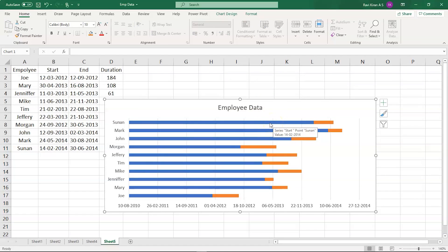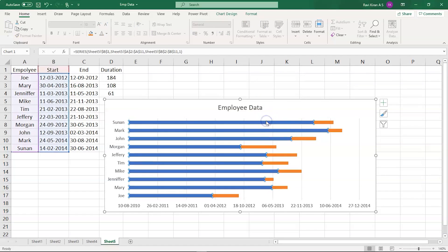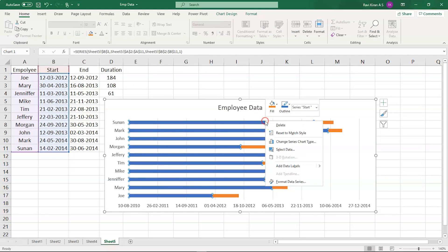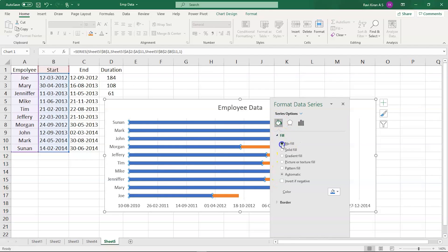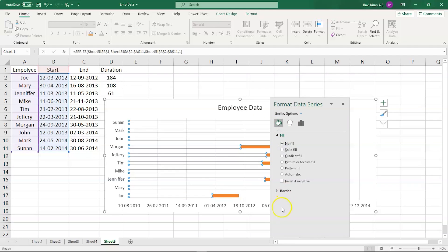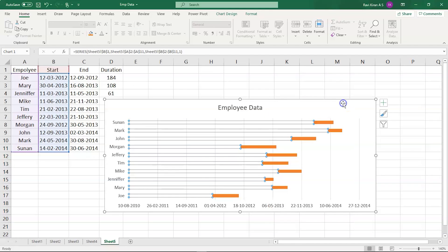Still, it's not complete yet. So to finish it, you need to select the blue colored bars here and right click on them and select format data series. Go to the fill icon and select no fill. And it's done for now.